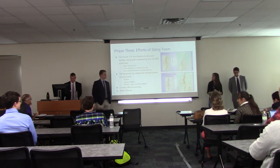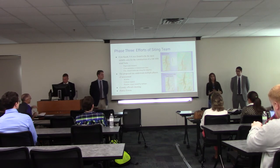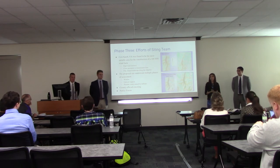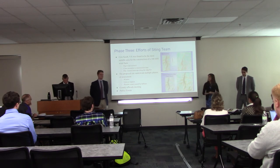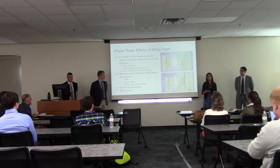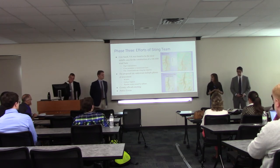So the siting challenge, the siting team was responsible for determining a location for a plausible and feasible 100 megawatt wind farm within a 100 mile radius of James Madison University. After extensive research, they decided on Cow Knob, Virginia. This was because of its location. It's located on a high ridge, therefore it has a really great wind resource and that's consistent. They also were looking into how the transmission lines had been recently installed, which made the project much more feasible.